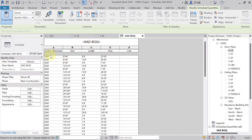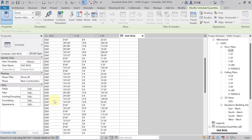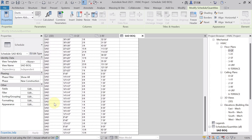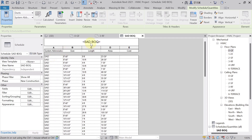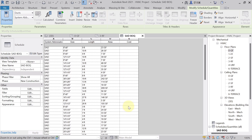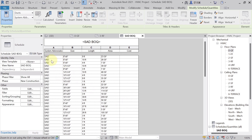The supply air duct Bill of Quantity is ready. Under System Abbreviation, 'Supply Duct' is shown because only the supply duct was run in this project. You can see the size, length, and area of each duct. Once you have the area, you can calculate the cost based on the market rate per square foot.